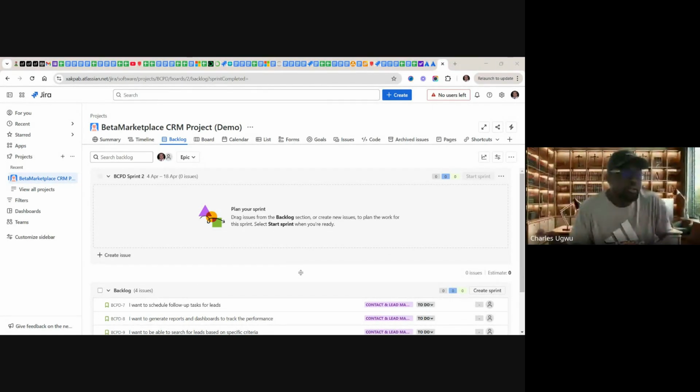The product owner, you cannot change when the sprint is on. You can cancel, but bringing more work items onto a planned sprint is not advisable. But the product owner can cancel. I think you've asked this question before, and I've addressed this question.